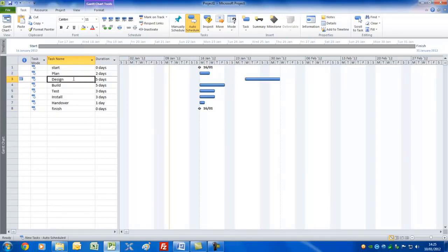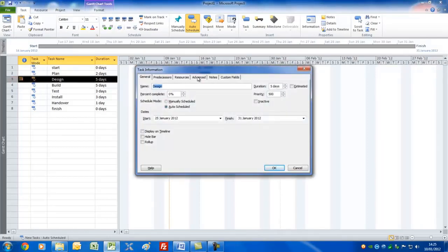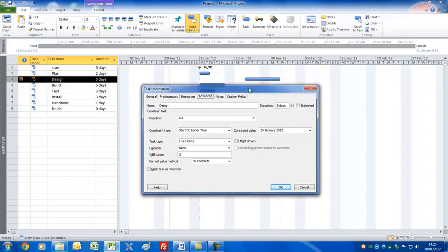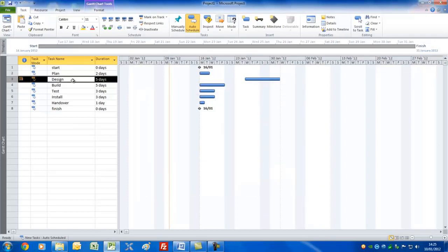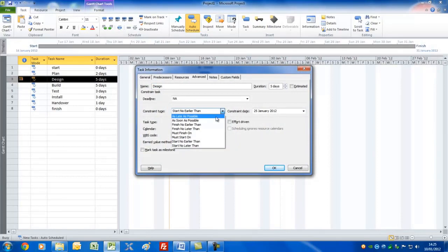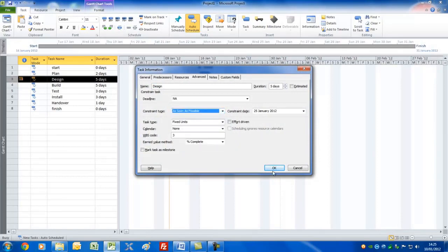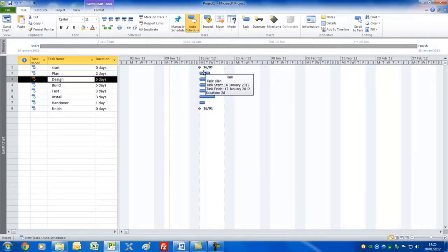Be careful not to move tasks horizontally because it will set up a constraint. You can find out information on any task by double-clicking its name. If I go to Advanced, I can see that by moving it out in time I've set a 'Start No Earlier Than' constraint — a brick wall in time that the task will not go before, which is bad unless it's a real constraint. Always link by dragging down or up, never left or right.